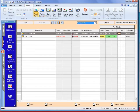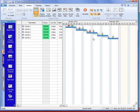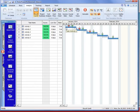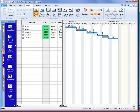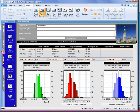In the analysis, the result Gantt shows all the risks assigned to the schedule, including the cost risks. The original schedule is the white bar, and the simulation result — in this case the P50 — is the blue bar. Because of risk and uncertainties, the schedule is shifting to the right, meaning it's going to be longer and cost more. In the project summary, without risk the project would be 25 days and $35,000, but with risk at the base it's going to take 30 days and cost $38,000 — about $3,000–$4,000 more.